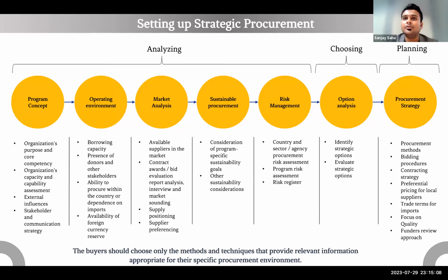So let's say if a local supplier bid for a product at a price of, let's say, 200 naira, while a foreign supplier bid for the same product at a price of 180 naira, depending on how much of price preference is given, the local supplier may still win with a higher price. Okay, so this is generally done to promote local production and local manufacturing of products.